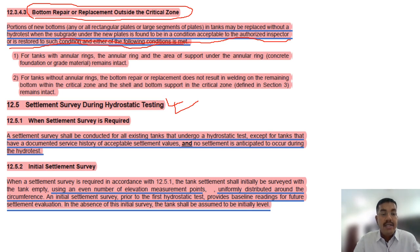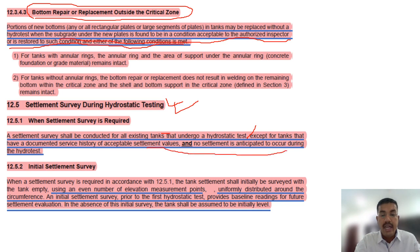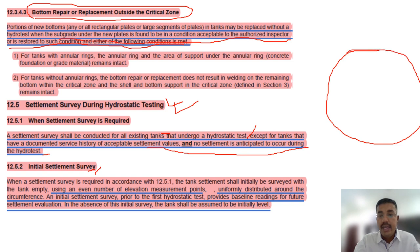Settlement survey: a settlement survey shall be conducted for all existing tanks that undergo a hydrostatic test, except for tanks with documented service history of acceptable settlement values and where no settlement is anticipated during the hydrostatic test. For tanks with a major alteration or major repair, a hydrostatic test and settlement check are mandatory. Tank settlement shall be measured during filling and when the test water reaches 100% level, held for 24 hours; after draining, the settlement reading is taken.